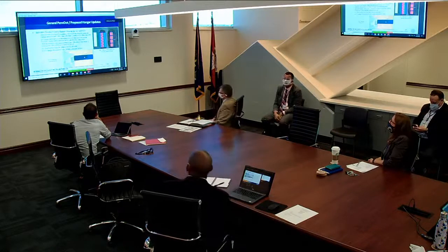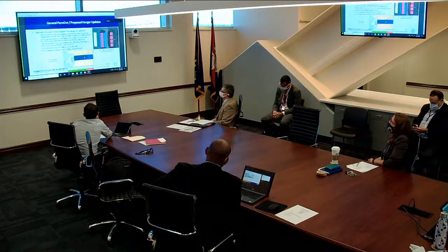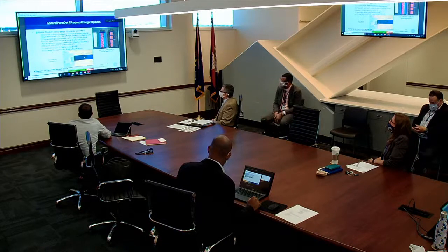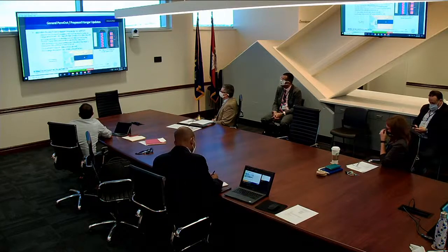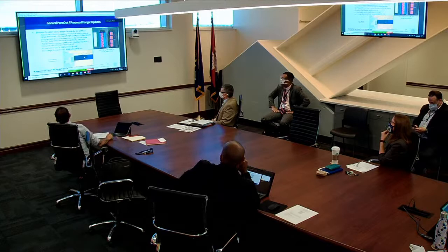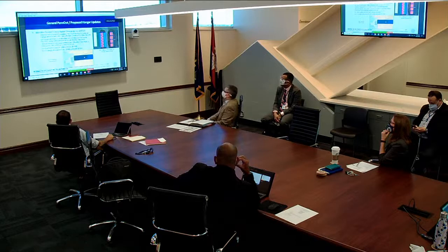The site work for most of that is just under $1 million. So that component might help if we're submitting for the applications. And I know we've talked a little bit about other third parties that might be interested in building hangars if we have the state funding to do some of the site work piece of that. And again, same thing at Braden, just for that single T hangar, which is right where one of those shelter tie downs are. Again, site work's less than $1 million. To actually develop that is somewhere around 3 million if you add all the paving and the other pieces to it. So again, trying to be strategic regarding those components.